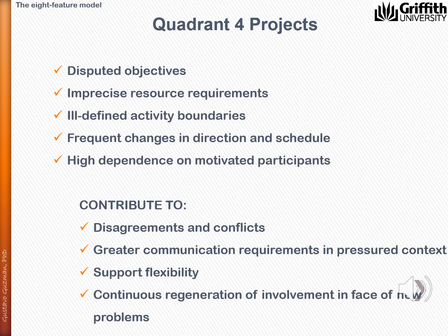In summary, complex projects that evolve in Quadrant 4 are a hierarchical network of components and subsystems. Different organizations usually participate at different stages. The high level of interdependencies between key players is important because this means that there is a significant need for coordination and integration activities. They are crucial for success and failure. On the screen you can see additional characteristics of Quadrant 4 projects.